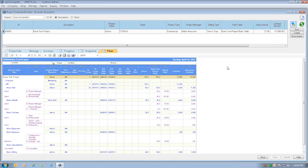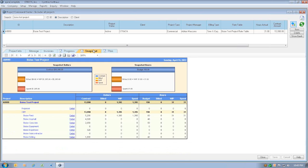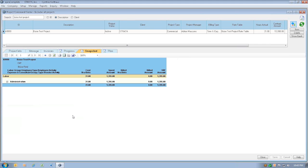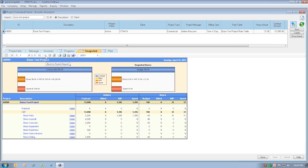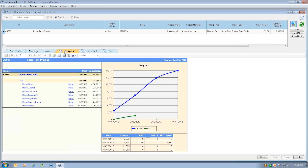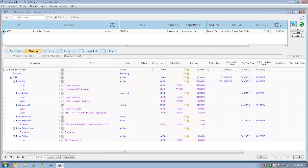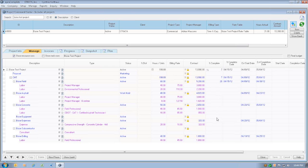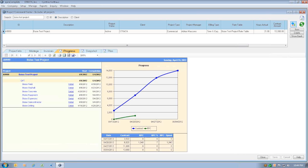I hope this section has been useful. As I mentioned, the most frequently used report that we see is definitely the snapshot report. People like to compare their current contract with their current spent. And then it's great that they can drill right into and see where the spending is occurring. As people enter their timesheets, these fields are going to complete for you. And then the second most handy report is definitely this progress tab. This tab is great at comparing where you thought you would be with where you actually are. The only necessary fields are you have to know what your beginning and end dates were going to be. And you have to estimate how far along in the project you are. But once you've done those three things, you can drive this progress report.